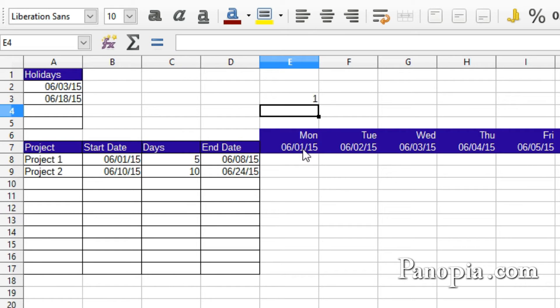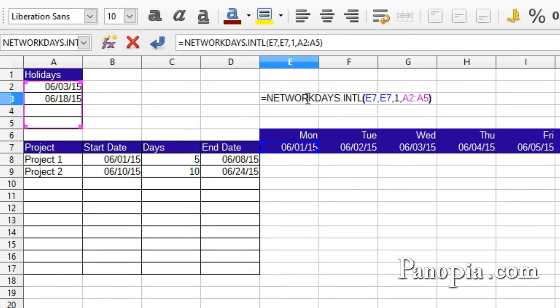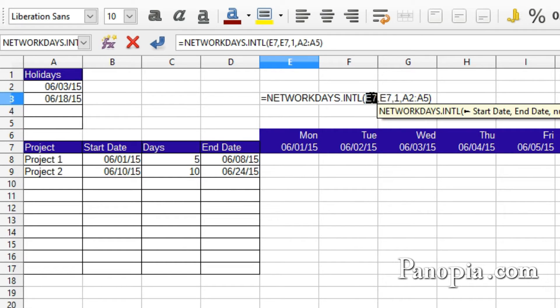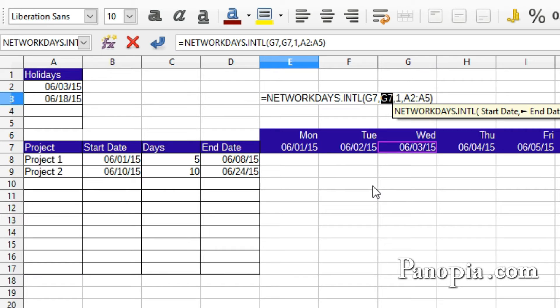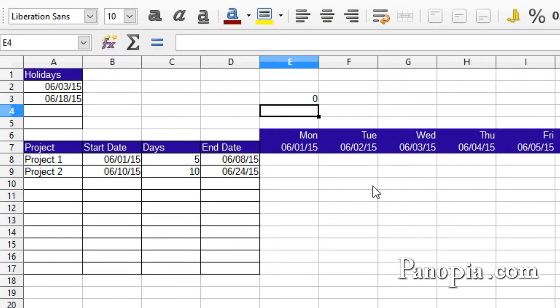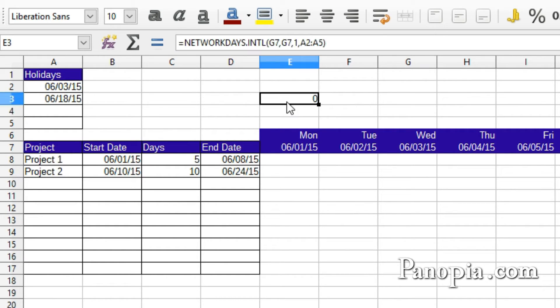Now I'll double-click E3, and select the start date, and click G7. Then I'll select the end date, and click G7 again. Now press Enter, and I get a 0. 6-3 is a holiday, so it returns 0. There are 0 workdays between 6-3 and 6-3.